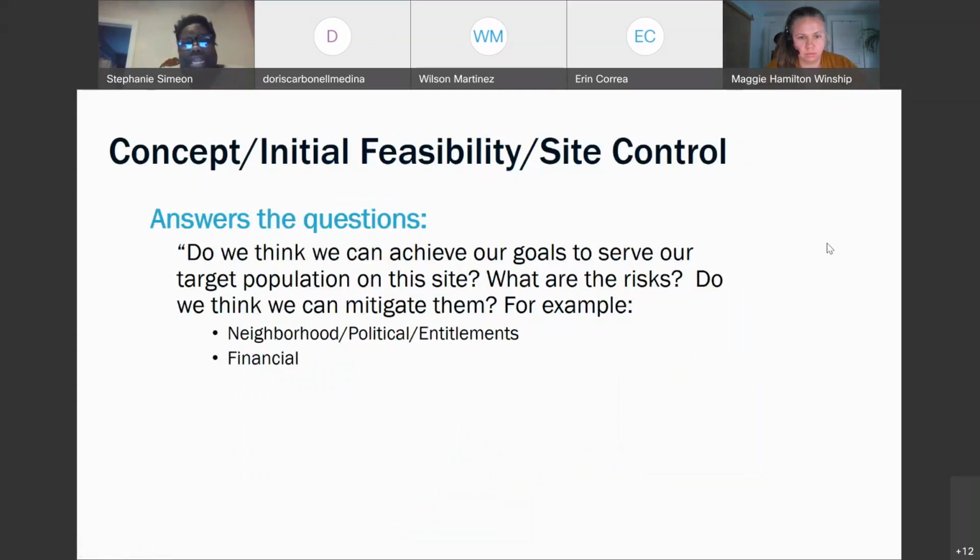This agreement simply says, we, the city of Buffalo, will give you, ABC Community Development Corp, control of these parcels of land for the purposes of affordable housing development. It will give it to you for a certain term, based on the fact that you need that site control in order to get funding. So there's no cash exchanged here. It's just a letter saying that you have temporary site control of this city-owned land while you're seeking finances.